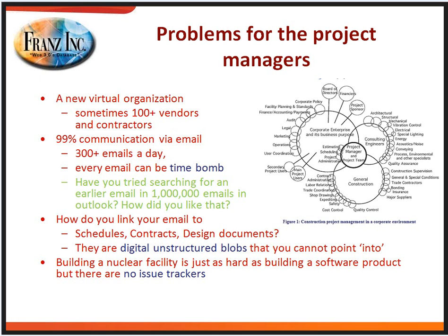I mean, say you get an email that says, hey, the door will be 2 days late. That's not a problem, is it? Well, you can't say yes. The lawyers teach you not to say yes in this case. But you have to now go to your design documents or your schedule to figure out whether the door is indeed too late, and this is very important, whether or not you should send out a notice to the other party that they're in trouble.